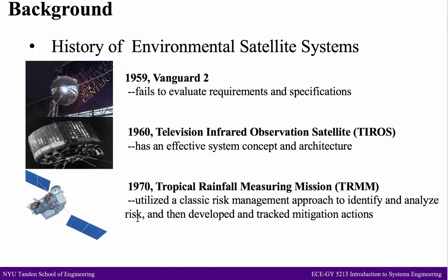developed and tracked mitigation actions. Identified technical risks were addressed at a weekly chief engineer meeting and often tracked by technical performance measures. The program office, serving in the clear role of integration, issued a request for proposal to serve bidders for developing concept and mission designs.